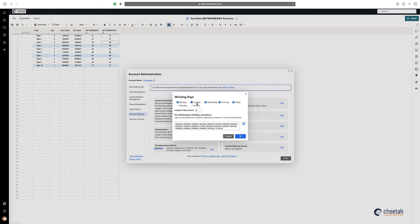So therefore, if your working week was Tuesday, Wednesday, Thursday, Friday, Saturday, then obviously Mondays and Sundays would not be your working days. And actually, NETWORKDAY would calculate that based on these settings here.